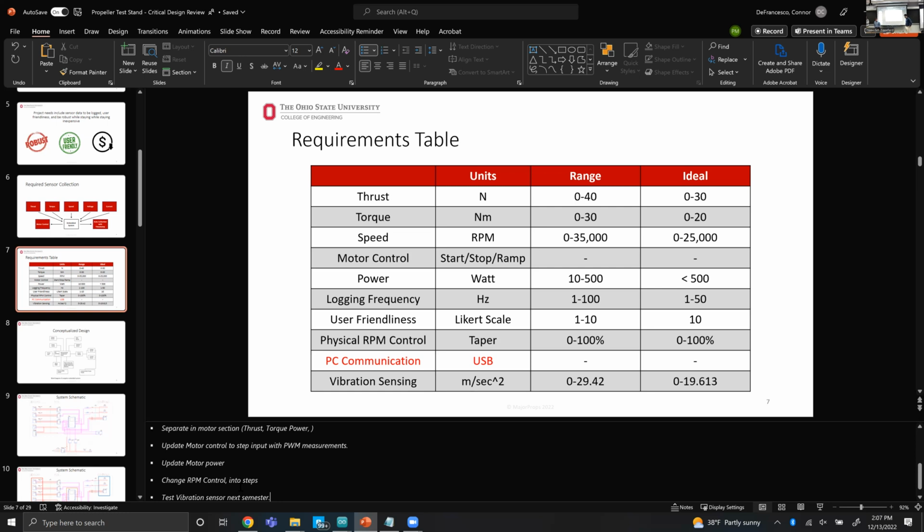Your test plan draft is in March? No, it's going to be in January. That's one of the assignments. The idea is that while you're designing, you think about how you're testing this, and you write your test. I have a format that you just fill out. As you go, you might realize this is not good, I need to change my test setup or add a few more tests, and we update that document. This is your whole assignment for the whole semester.